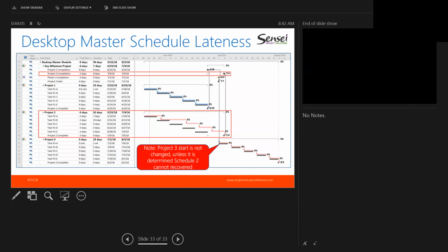If I then go out to my system and I open up a new project, or open up my browse for my projects, and I open up project 3, you can see that I have project 3. I'm going to check it out. So I now have 2 projects open. We're going to go ahead and create the link. So to do so, I'm going to go to View. I go to a new window. I select my first project, the second project, and I say OK. And this opens up this virtual master.